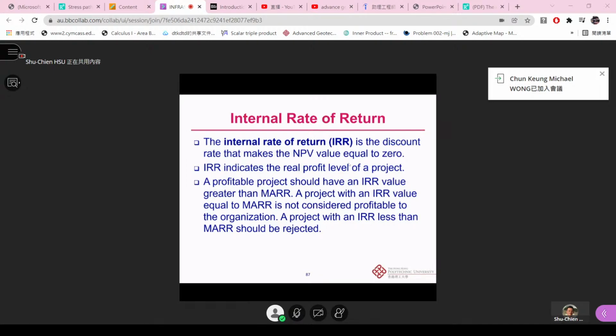Not only did we talk about how we calculate that, we also demonstrated some examples comparing different alternatives using the present value, the present worth method. Remember that using the present worth method, we need to use the least common multiple of the periods of the useful lives of those alternatives so that they are comparable. It is nonsense to compare alternatives with different useful lives.